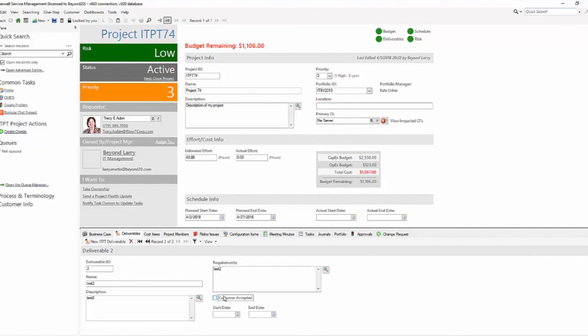With your deliverables, you can let us know whether the customer has accepted the deliverable or not. You might do some additional work with this and say here's our deliverable. Does the customer accept that this is a deliverable? And then does the customer accept that the deliverable has been delivered? Right now, the customer accepted is just a logical field that really doesn't do anything. Your use case may be that they've accepted that this is indeed a deliverable of the project. But its intent is that the customer has accepted that the deliverable was met. I would look at making two different fields there. One that the customer accepted it's a deliverable, and another that says the customer accepted that it has been delivered.